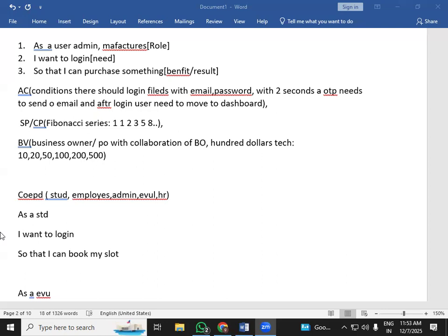That's how the $100 technique helps us decide which is most important for the business. Here business means the stakeholder business. Yes, priority: in the Jira tool you can set a priority, and that will also act as a $100 technique.